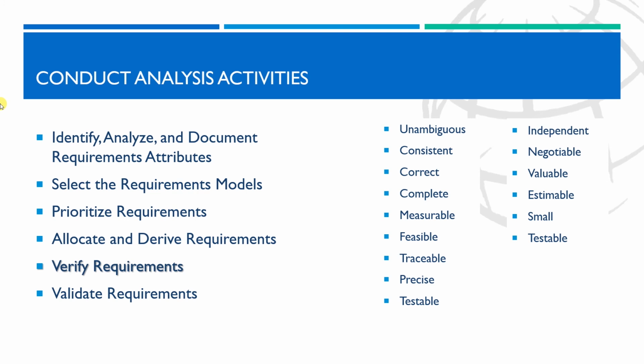The third point is to prioritize requirements. Requirements prioritization is an important step in managing product scope and is used to rank requirements in the order of importance. It is used to assist key stakeholders in making trade-offs between requirements and to analyze the relative value of requirements against one another.